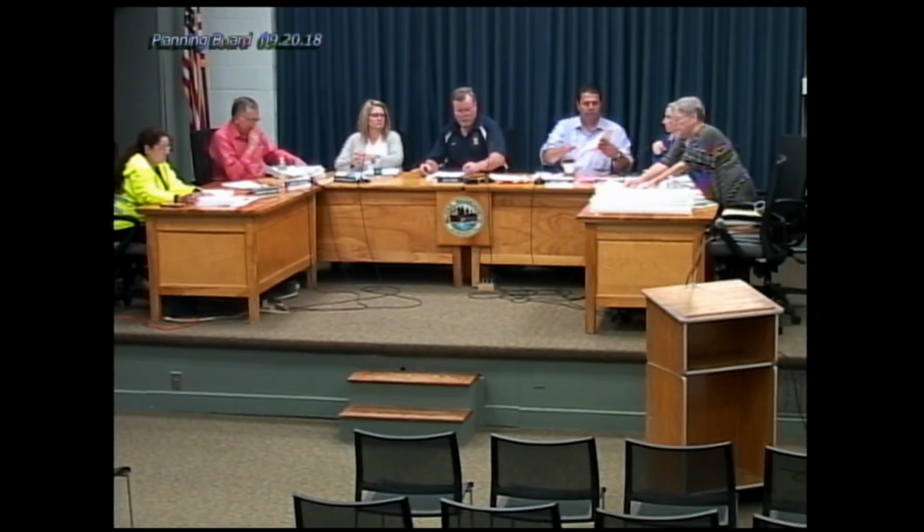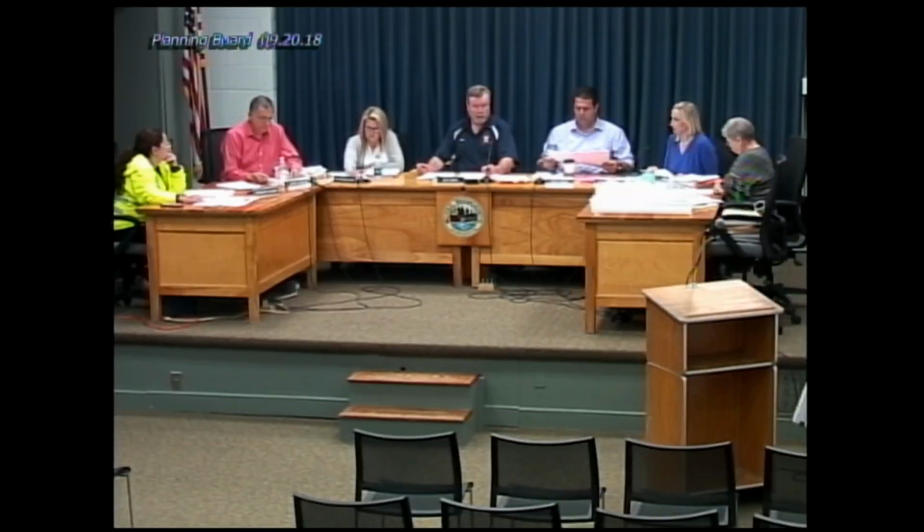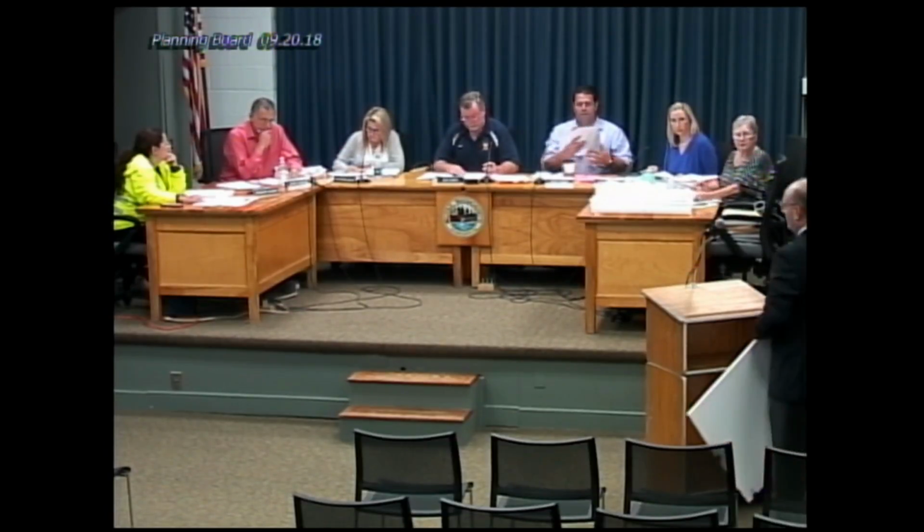And a new traffic study came in this morning. What we were supposed to have been doing tonight, okay, go ahead, John. We're going to talk about traffic, but can't talk about traffic because we just got the traffic study back, correct? Right, because probably it really wasn't thought through at the last meeting, but you can't really take the traffic counts until after Labor Day, and then you need some time to put the study together. So it was highly unlikely, or impossible really, that it would be submitted in the 2-week period prior to tonight.